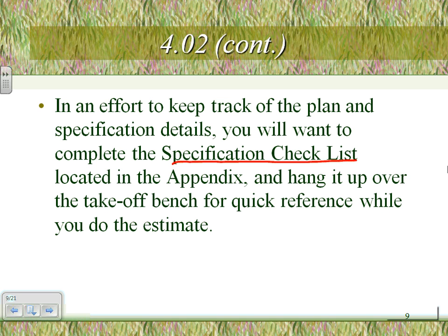Then you go to adding labor, additional labor for as-built, demolition, energize, and all this good stuff. Direct job costs, permits, and so forth. All the way, other conditions, conductors. So this sheet is going to help you adjust your labor. Any questions, guys, about the specification checklist?